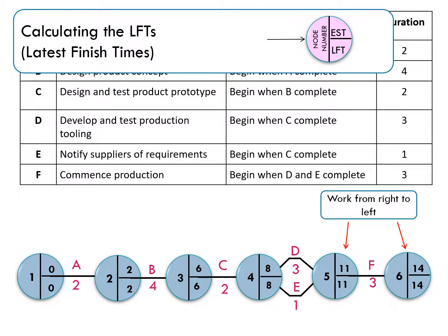Let's move on now and look at calculating LFTs, and this stands for the latest finish time. And so the latest finish time is telling us what is the latest that the activity to the left can possibly finish to not delay the project. So for this one, we go back, rather than from left to right, like we do with ESTs, we go back from right to left.